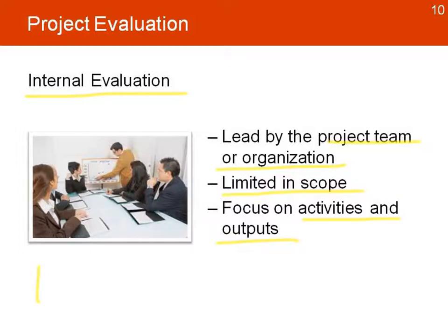If we have a project that has a timeline in which we're going to have our midterm evaluation or the end evaluation, we might have some intermediate internal evaluations in between, which are quick snapshots that help us stop, raise our heads, and try to see where we are and what is happening and what little changes we can make.